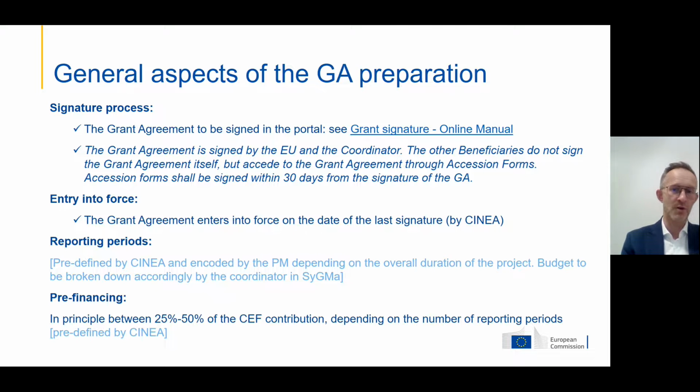What you need to do, though, is to adjust the budget and break it down in accordance with the reporting periods, and perhaps shift some figures here and there so they all match. Actually, it's quite normal that these reporting periods are different from your submission, because you couldn't have known how we define reporting periods in a way other than annual.